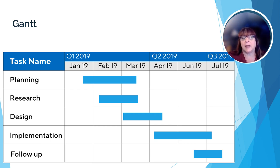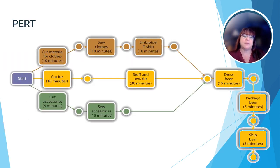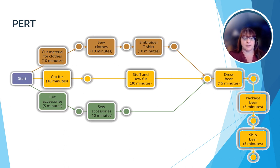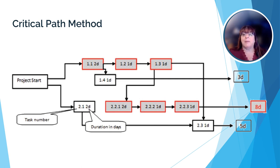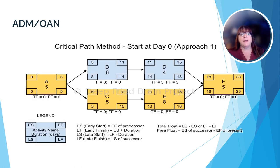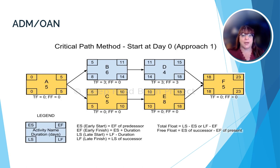The PERT Chart was developed as an enhancement to the Gantt Chart and uses nodes to show the tasks of the project and what tasks are directly related to other tasks. The Critical Path Method takes the PERT Chart a little bit further and identifies tasks that must be completed before others can be started. Following the path for those tasks makes it the critical path. The ADM or OAN Chart takes the PERT Chart and the Critical Path Methods a bit further still by showing the impact on the project should one or more tasks be completed early or late.